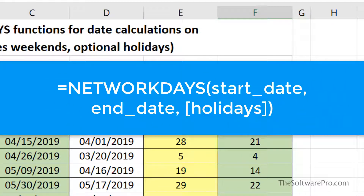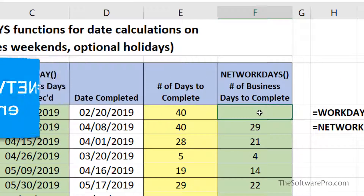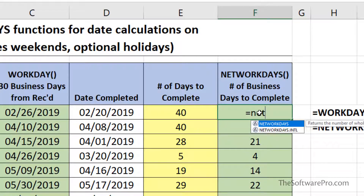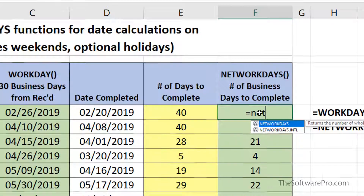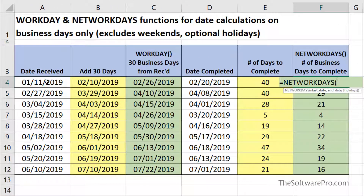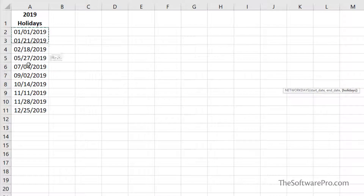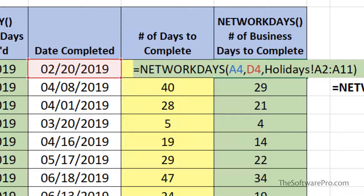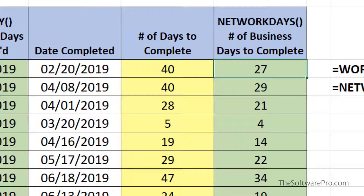If you'd like to calculate the difference between two dates while excluding weekends and holidays, use the Net Workdays function instead. This also looks for three arguments: the start date, the end date, and optional holidays. Let's build this formula to calculate the number of days it took to complete this particular process or project. I'll simply hit Tab to accept the suggested function, or you could double-click on it. Once again, we'll provide the start date, comma, the end date — which in this case is the date completed — comma, and refer to that holiday list. Here you'll see the final results from this function. Unlike the Workday function, the Net Workdays function does include or count the start date in the results.